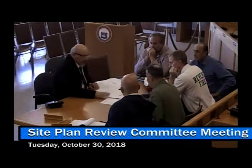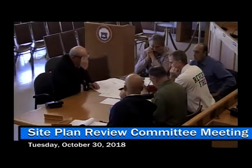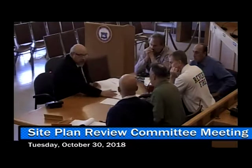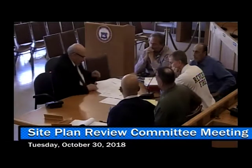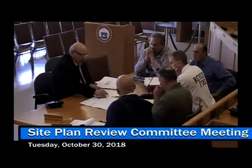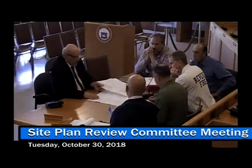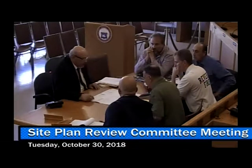So we filed the application with the ZBA, appeared before them and also met with the ward counselor. There was no opposition before the ZBA except for the ward counselor saying he didn't approve of the three spaces, didn't want to set a precedent, delivered a letter. So the ZBA asked if it would be possible to come in with a revised application showing four spaces, but having three of them in the only place we can fit them, across the front. So this is what we would hope to amend to appease both the ward counselor and the ZBA.